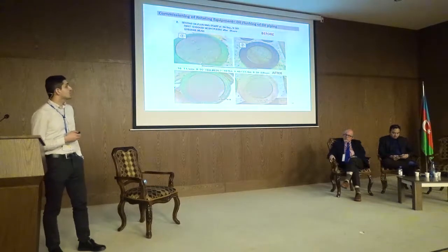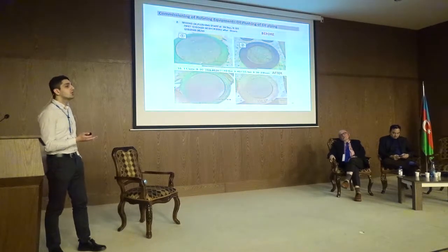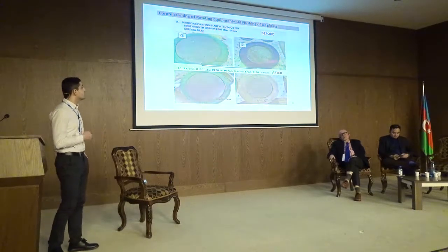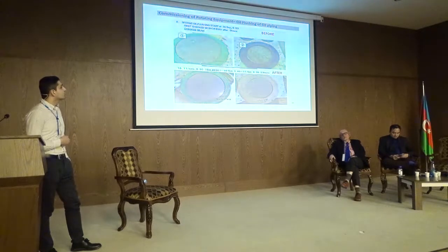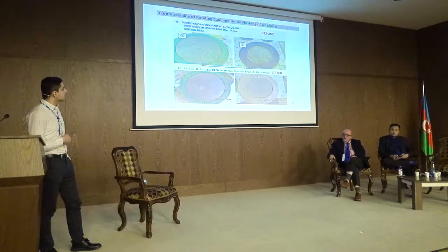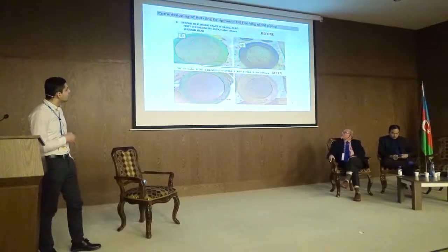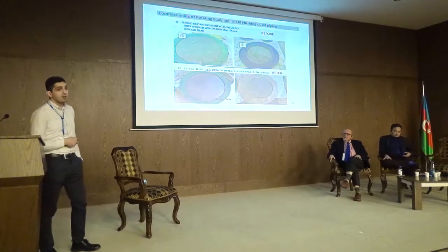And during the lube oil flushing, we are putting some meshes onto the return line into the lube oil tank, as you can see. The top meshes were removed after the second flushing, whereas the bottom meshes were removed after the 15th flushing. So we did 15 flushing recirculations, and it took like 2 weeks. And as you can see, the top meshes are quite dirty, but the bottom ones are very clean.